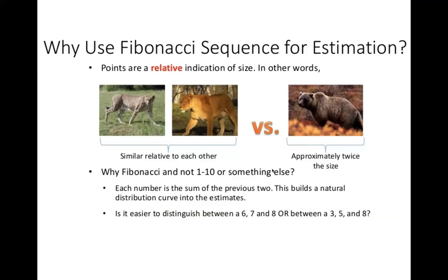Now, for the estimations of user stories, we provide story points using different techniques. Some people use t-shirt sizes, some use odd and even numbers, some use the Fibonacci sequence. From my understanding, the Fibonacci sequence is a very good technique to provide estimations or story points, because it's easy to compare one story point to two story points, and two story points to four story points stories.